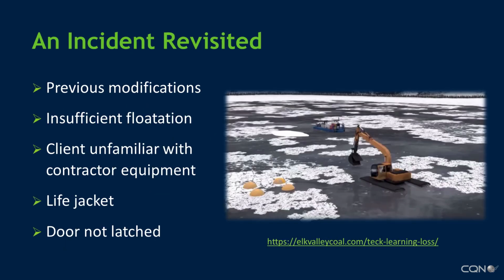Let's revisit the floating excavator incident. The investigation report identified many contributing factors. Consider each of these and assess where a well-executed kickoff meeting may have made a difference. Previous modifications made the machine heavier than the pontoon design allowed for. The machine was operated in water too deep for the pontoon design. Investigation indicated that additional flotation capacity was required.